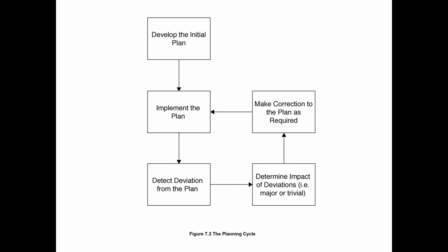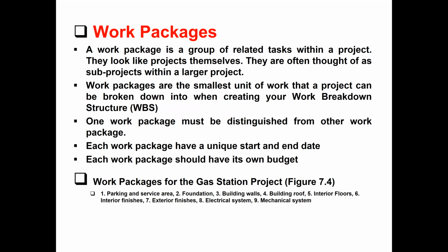And update our plan if we have to add more activities or have to go into more detail for those activities. What is the cost of each work package, or what is the duration of each work package? If there is a change, we need to update and compare it with the baseline, and we should revise our planning. So with this, let's move to the next slide.